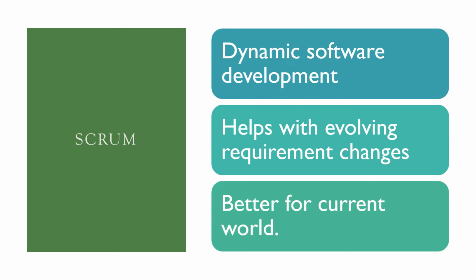So let's say now they wanted a different login methodology or feature. What I can do, I can add new user stories for that and put that in the next sprint, which is the next development cycle. So entire development is not happening in phases.